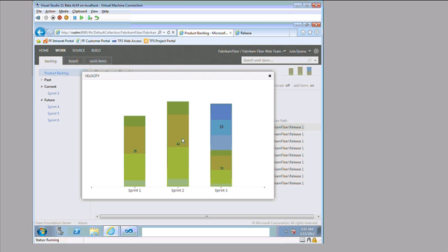We don't know how this team is measuring effort. We don't know the basis for those numbers. It doesn't matter, because all that matters for us is that whatever system they use, it's consistent. We don't know why that story is 8 points, but we don't have to know that. All we know is that we can do a certain number of 8-point stories in a given sprint because that's what we've done in the past. That is key to Agile: that ability to build, try something, measure the results, and then learn from what you've measured, and over time improve your ability and make the necessary changes. So here in our current sprint, we've got 18 points completed and 23 still in progress.